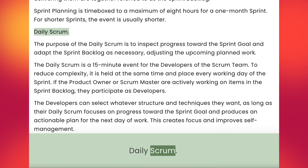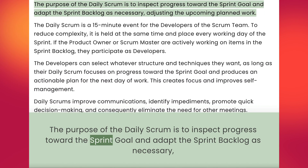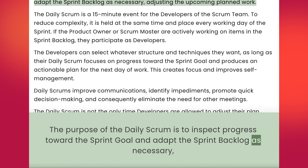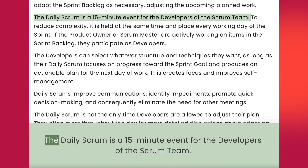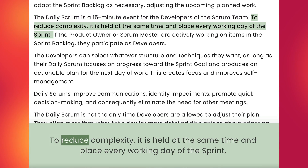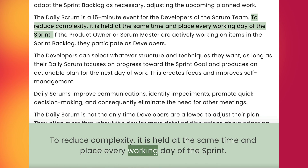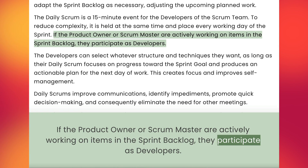Daily Scrum. The purpose of the daily scrum is to inspect progress toward the sprint goal and adapt the sprint backlog as necessary, adjusting the upcoming planned work. The daily scrum is a 15-minute event for the developers of the Scrum team. To reduce complexity, it is held at the same time and place every working day of the sprint. If the product owner or Scrum master are actively working on items in the sprint backlog, they participate as developers.